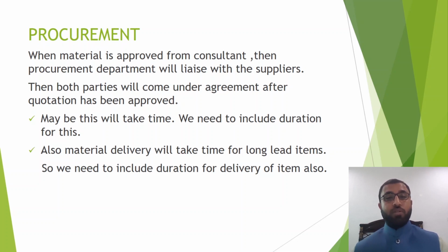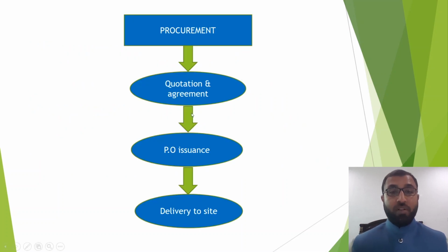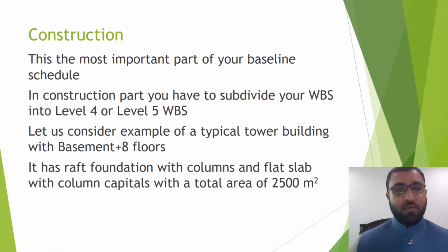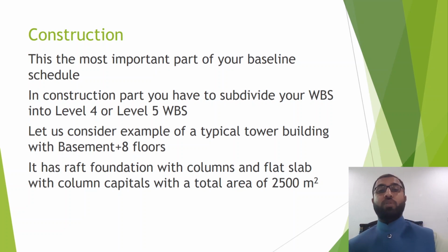So we need to include the duration for this. Also material delivery will take time for long lead items. Then the procurement process involves some 2-3 stages. First, quotation and agreement, then the PO (purchase order) issuance, then delivery to site. So before discussing the construction WBS, because this will take a longer time, tomorrow we will discuss about it in our next video. So today we will start building the WBS.